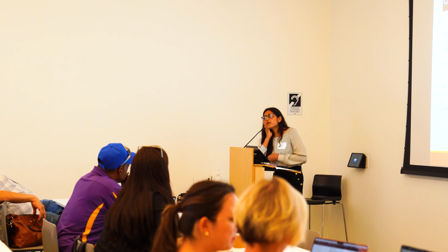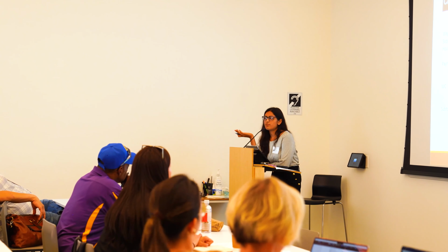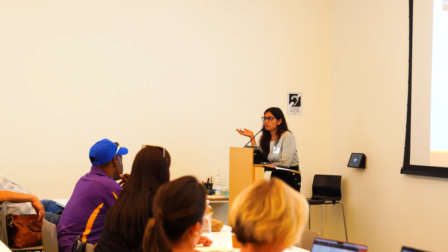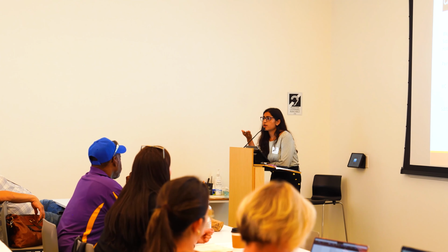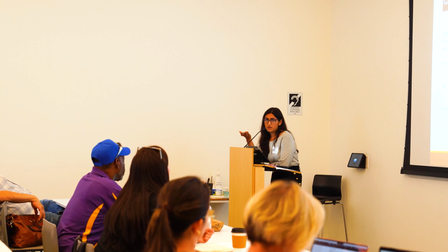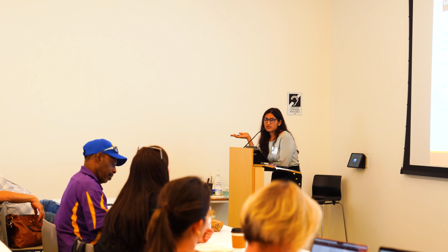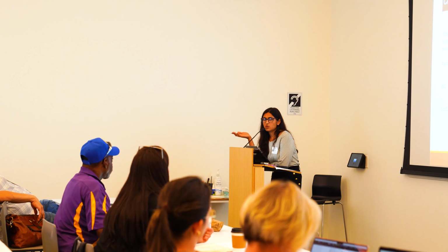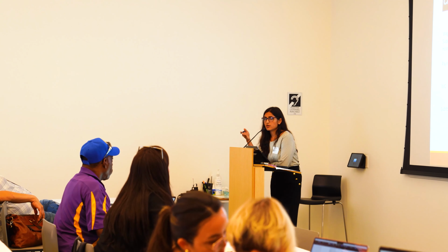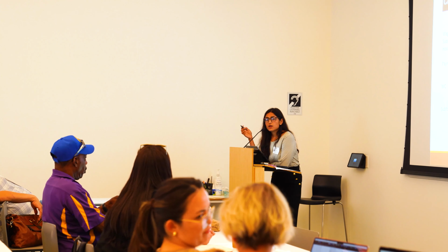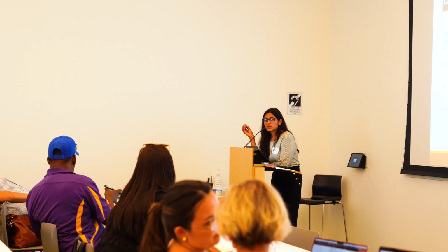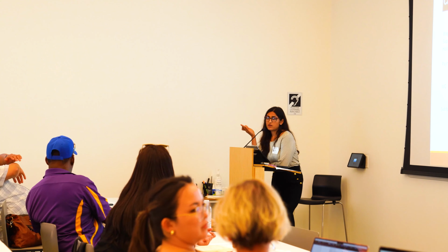Any overhead, I would say, is like, as I was saying, paper printing and your back office kind of stuff. Like if you have a payroll department, you're still paying them, but you can't bill that directly to your project. You're going to bill it proportionally to the project, in terms of overhead.